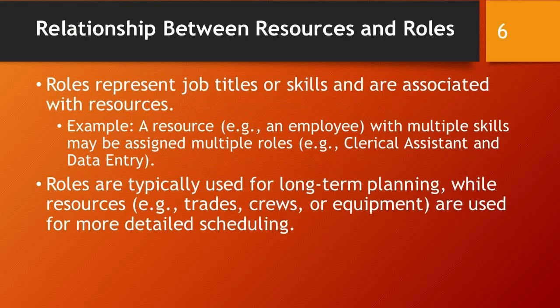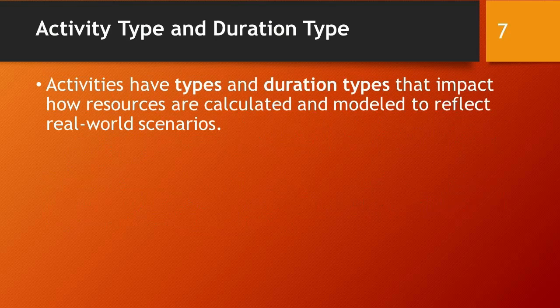The relationship between resources and roles is significant. Roles represent job titles or skills and are associated with resources. For example, a resource, such as an employee, with multiple skills may be assigned multiple roles, like clerical assistant and data entry. Roles are typically used for long-term planning, while resources, such as trades, crews, or equipment, are used for more detailed scheduling. Activities have types and duration types that impact how resources are calculated and modeled to reflect real-world scenarios.